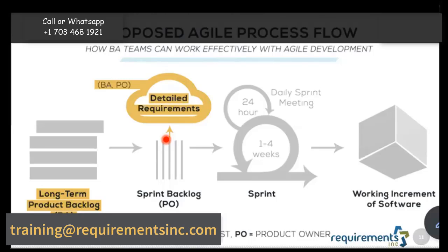And that would be the average of these 3 numbers: 10 plus 12 plus 11 divided by 3, right? So that gives you your average throughput in the last 3 sprints, and it tells you what your potential throughput is in the coming sprint. The reason we always average the last 3 sprints is that sometimes you have outages, sometimes you have unexpected issues. It more or less evens out.